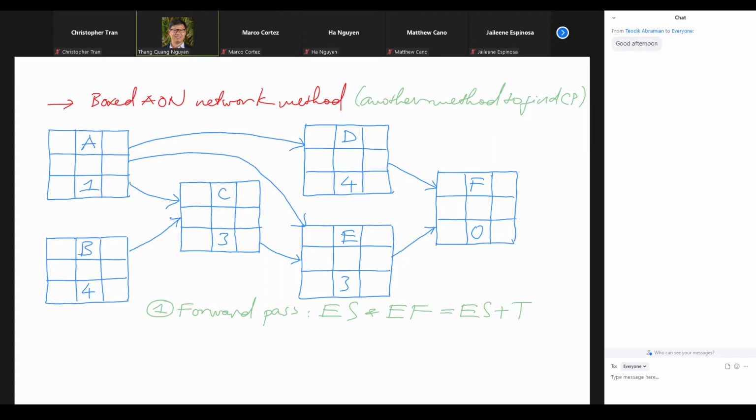So let's do that for A. A is a free activity, right? It means that there's no requirement before A. The bride-to-be and the groom-to-be can think about the date right away. So we can start at the beginning of time, or right away, right? So we call that 0.